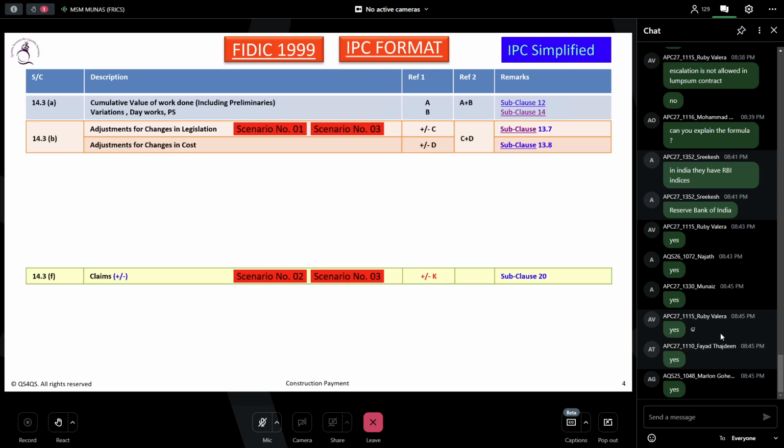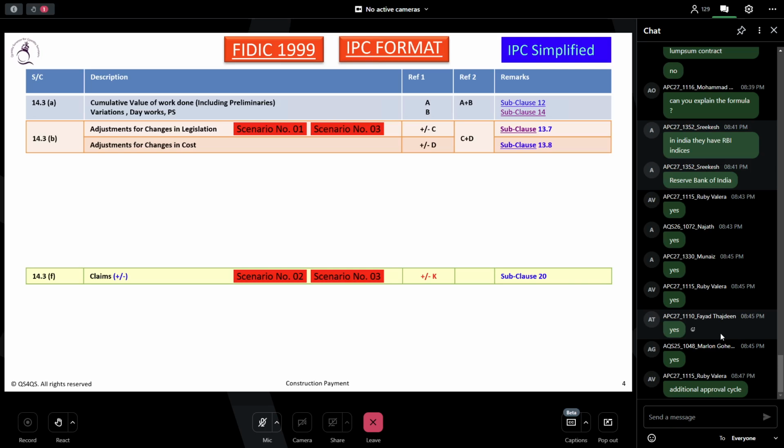They said working days are 5 days only, so people who planned the project for 6 working days will get 1 day of delay weekly, and monthly it is going to be 4 days. If it is a 5 or 6 month project, around 24 days, approximately 1 month, will be delayed.